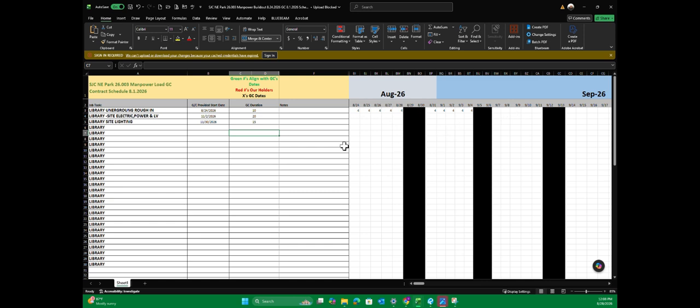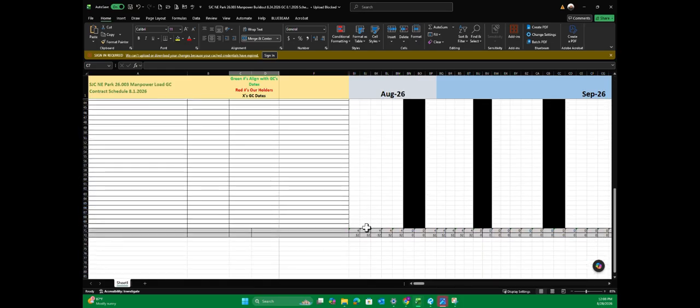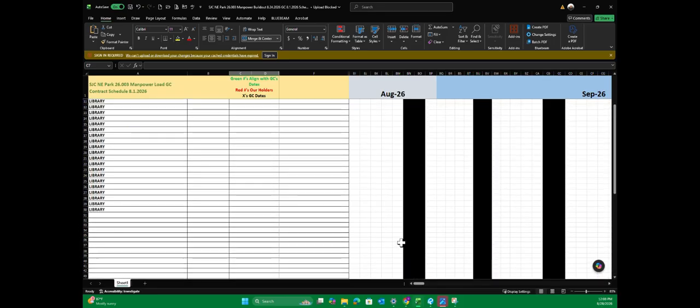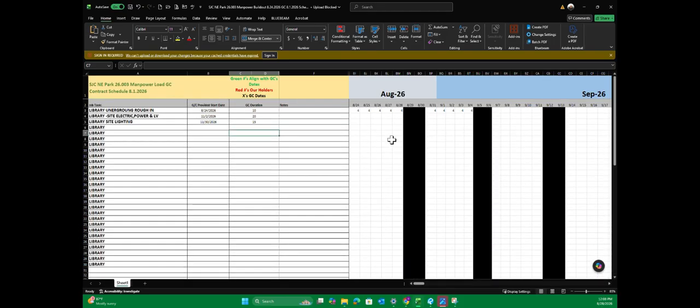And what that does is that when I get all this filled out, it populates at the bottom the total number of guys I need to have on site and the total hours that are going to be used on that site based on an 8-hour day. So I like this because it does two things. One, it helps me build my manpower based on the schedule, and it also does my look aheads for me. So you're killing two birds with one stone by plugging in these dates.